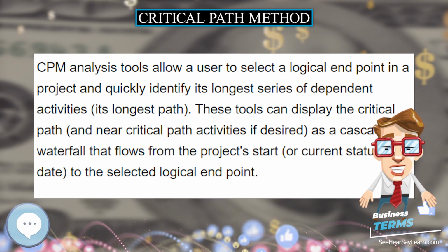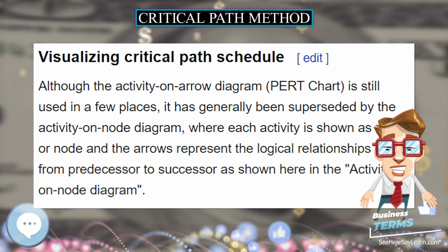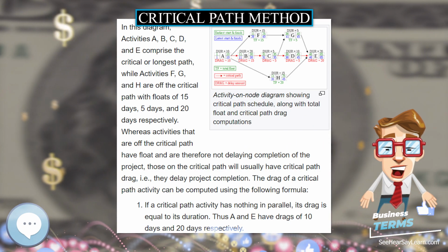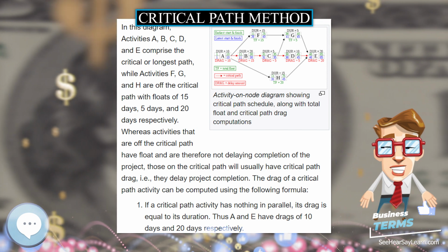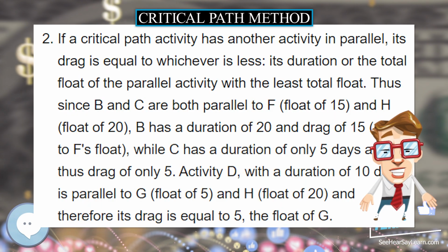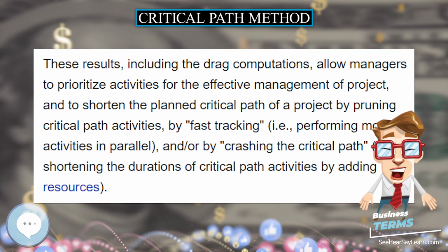In project management, a critical path is the sequence of project network activities which add up to the longest overall duration, regardless if that longest duration has float or not. This determines the shortest time possible to complete the project. There can be total float, unused time, within the critical path.